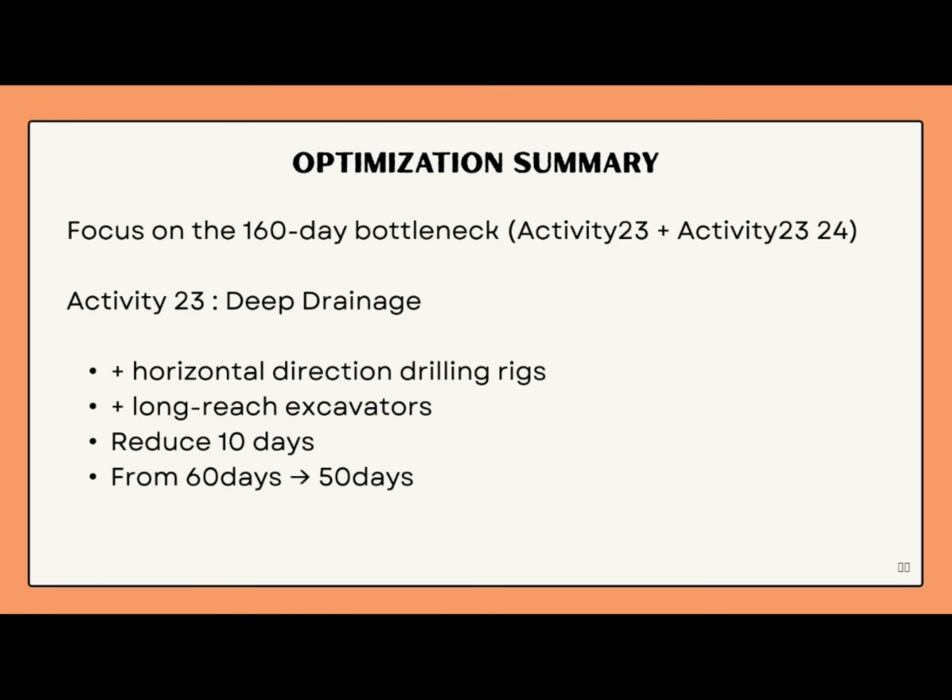In optimizing focus, the real bottleneck is the 160-day chain of activities 23 and 24. For activity 23, deep drainage, adding horizontal directional drilling rigs and long-reach excavators can safely cut 10 days.